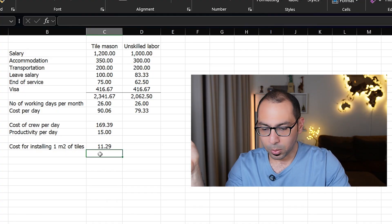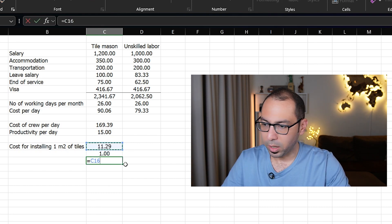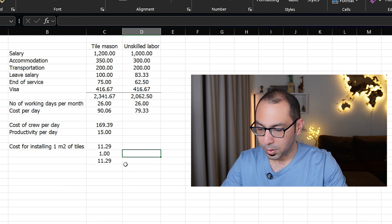The cost per square meter comes to around 11. However, the problem is idle man hours. This calculation assumes the tile mason and unskilled labor will be doing 15 square meters every day for 26 days per month for 12 months per year, which may not always be the case. If they are only working a percentage of the year, the cost will change. At 100% utilization, the cost per square meter is 11.